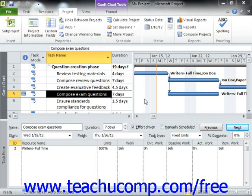In order to update multiple tasks in a project as of a selected date, click the Update Project button that appears in the Status group on the Project tab within the ribbon.